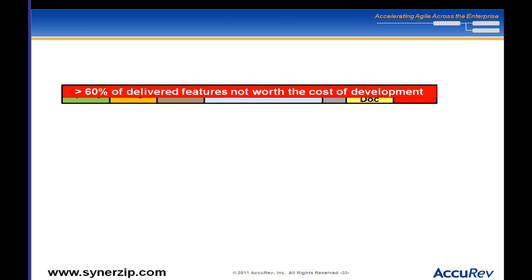The official study says 60% of delivered features are not actually used or seldom used. I interpret that as: they're not worth the cost of development. If they're not used, you've invested all this money but gotten no return. And it's not just the developer's time wasted — the tester's time, the doc person's time, the executive's time, the product manager's time, all the time spent getting those requirements — all wasted.